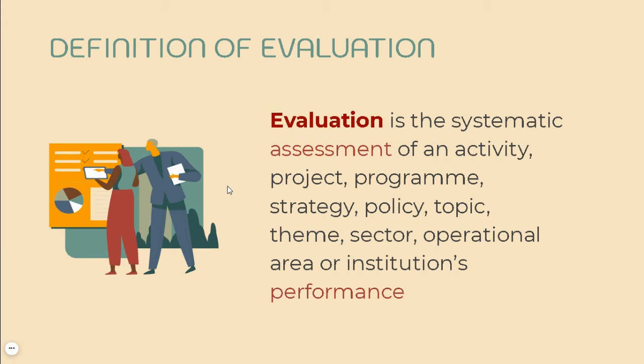Now, evaluation focuses, as we mentioned before, on outcomes that you expect, accomplishments that you were expecting, and it examines the full results chain from activities to outputs, outcomes, impact, and whether you've achieved the goals of your intervention. Sometimes you might even be lucky and be able to assess how much your intervention contributed to the results and how much was contribution from other external factors. Evaluation, unlike monitoring, is performed after the intervention. If your intervention runs over a longer period of time, it can also be conducted at predefined intervals during the program.